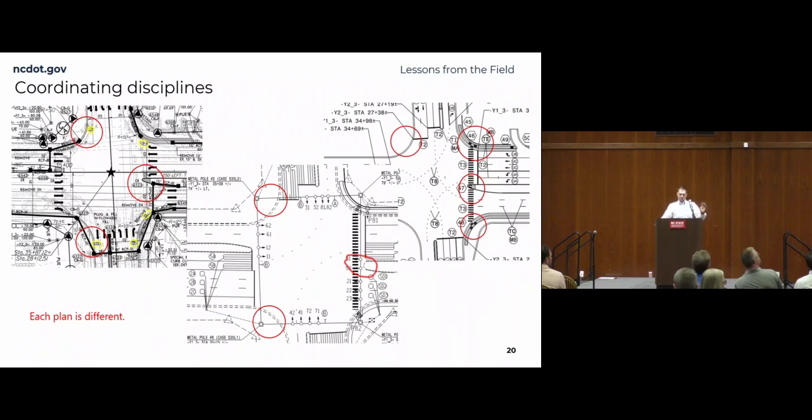So now we have to figure out who needs to be changing it, or a lot of times the curb contractor, if they don't see a cut through, the island's already been poured. Similar instances, sometimes they have curb cuts that may already be left open. And so we end up with some rework, but the bigger option is just trying to figure out which plan set we're following and how many adjustments we have. So we go back and forth. And sometimes, again, that seems minor, but we get to the point of just trying to see which one takes priority.